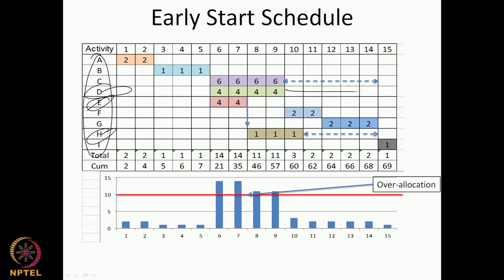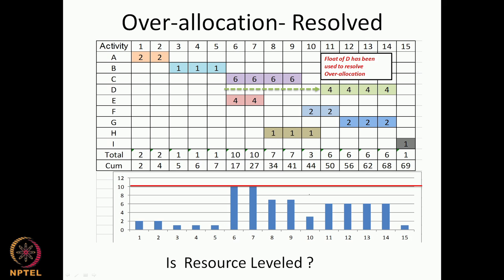We could move activity D within its float, and as H moved, G could also move to shift the resource profile. Based on these activities moving within the project duration using the float, the profile of the resources changed. In this particular case, rather than resolving overallocation, we are trying to level the resources — to make the profile as flat as possible.